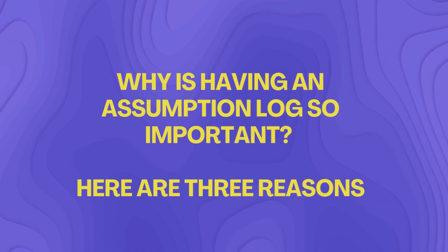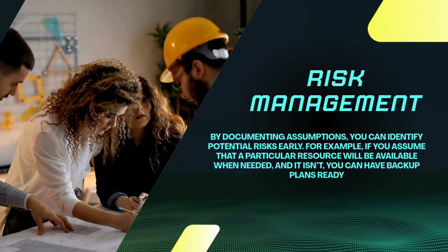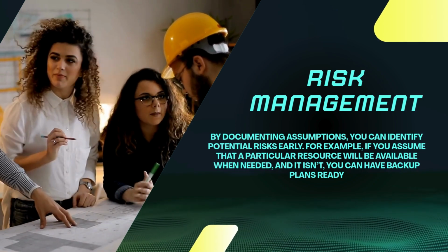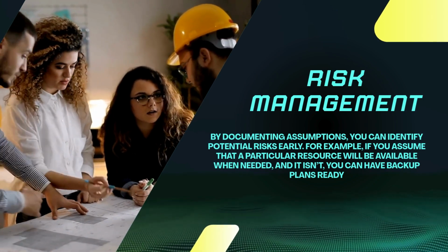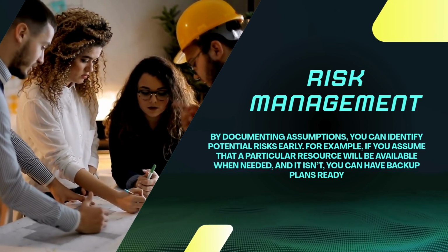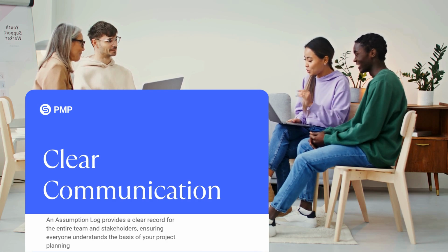Why is having an assumption log so important? Here are 3 reasons. Risk management. By documenting assumptions, you can identify potential risks early. For example, if you assume that a particular resource will be available when needed and it isn't, you can have backup plans ready.